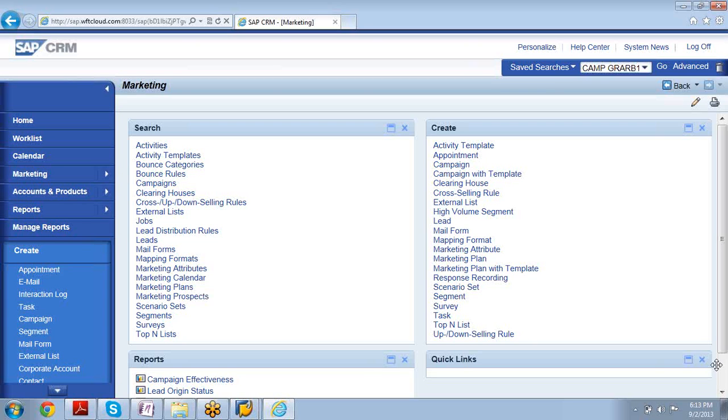Final preparation stage takes 10%, and project final go live will take another 10 to 15%. So this is how the overall effort of implementation, you will feel in the entire system while you're working.